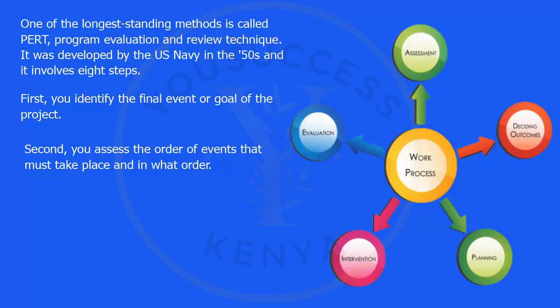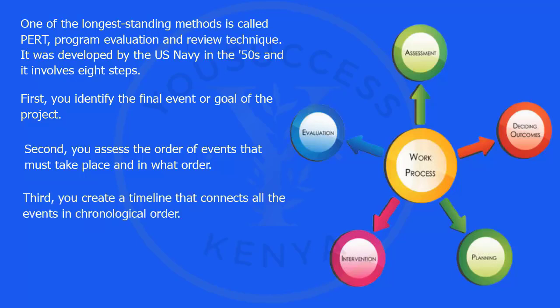For example, if I were opening a new restaurant, I would prioritize hiring people and purchasing cooking equipment. However, I should point out that in order to train personnel, I must first hire them, then produce training materials, and finally, in order to hire them, I must recruit them, and so on.